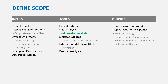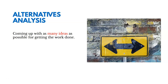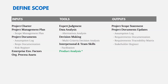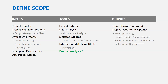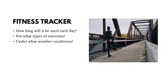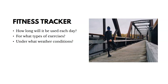Alternatives analysis is coming up with as many ideas as possible for getting the work done. Product analysis defines scope by asking questions about the use, characteristics, and other relevant aspects of what's going to be manufactured. For example, if you're creating a fitness tracker, you might ask potential customers: how long will it be used each day, for what types of exercises, under what weather conditions. The key output is the project scope statement — a detailed project description. You could also be making updates to requirements documentation, the stakeholder register, or an assumption log as you define scope.